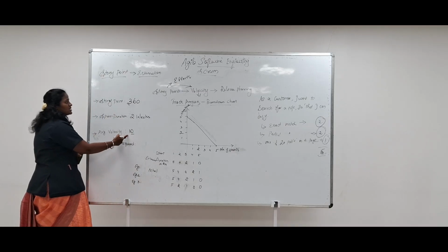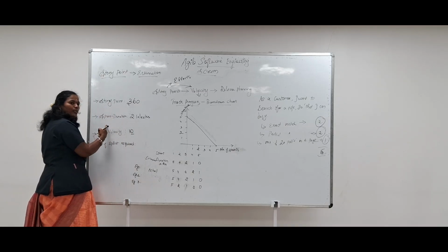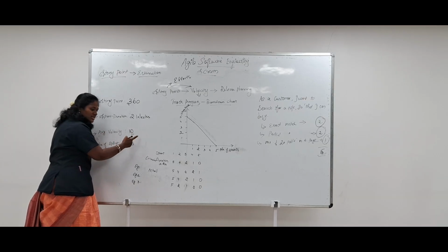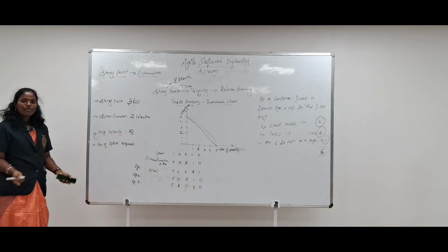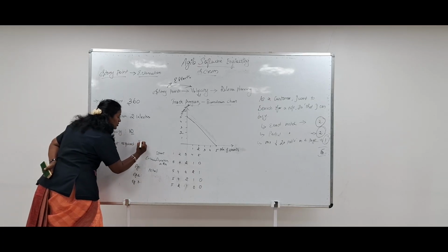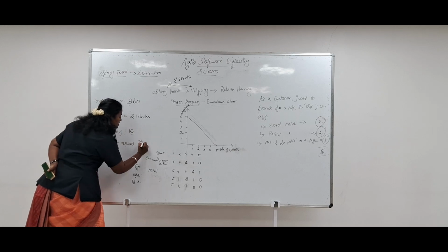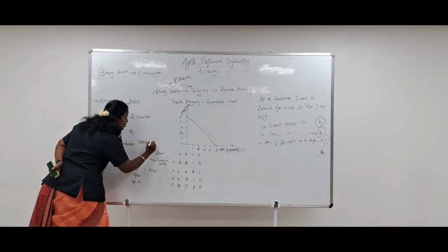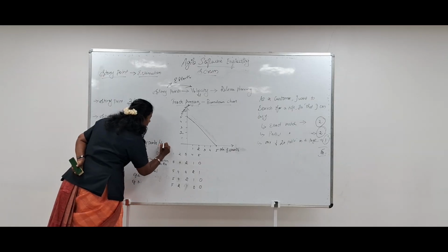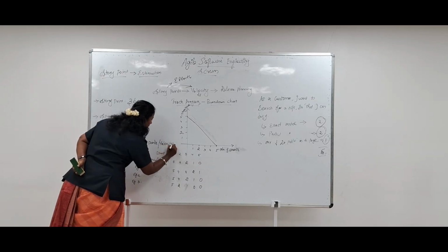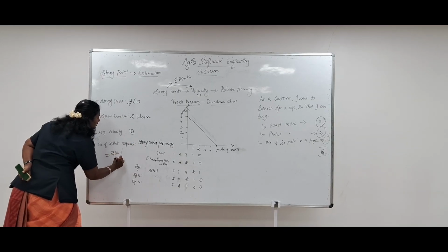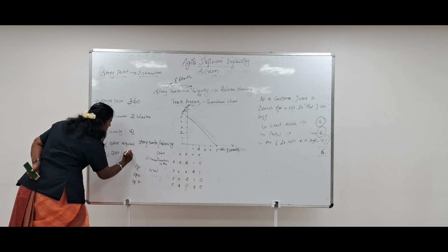From the velocity, we have the story point, and the duration is approximately 2 weeks, and the average velocity is 10. Now we have to calculate the number of sprints required. The number of sprints required is the story points divided by velocity, which is 360 divided by 10.